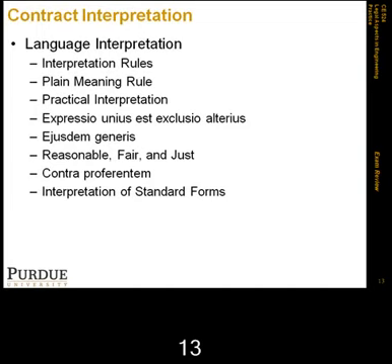So, for example, AIA contracts. How can we interpret them? We have a bunch of types of AIA documents. For example, the AIA standard agreement between owner and architect. This is a document that's viewed as more swayed toward the interests of the architect because it's drafted by AIA without consultation of owner organizations. So therefore, it could basically be interpreted more against the architects.